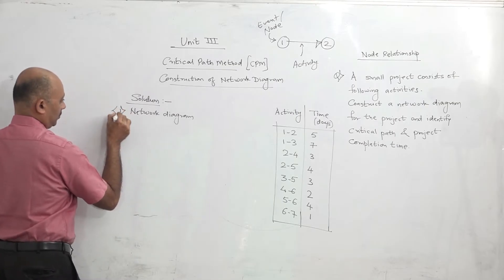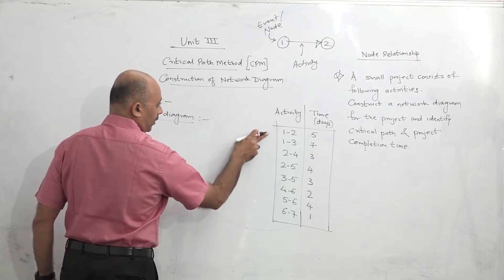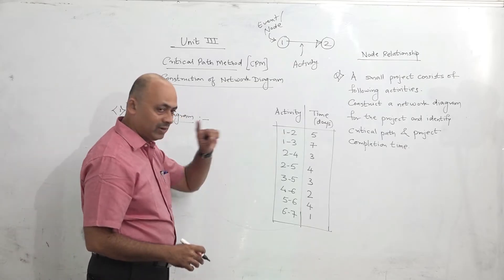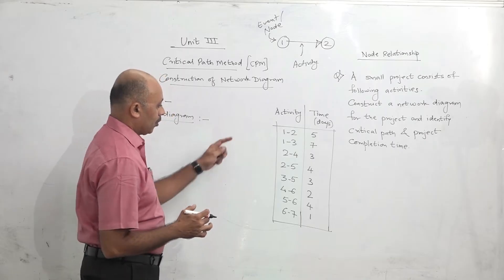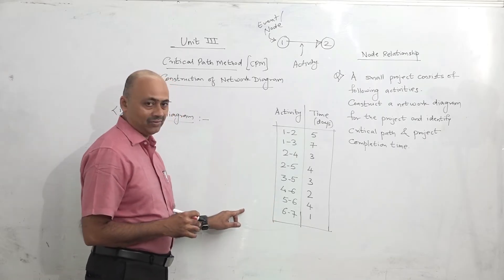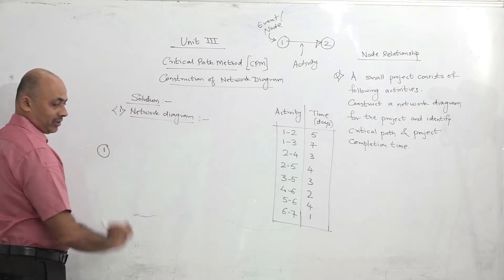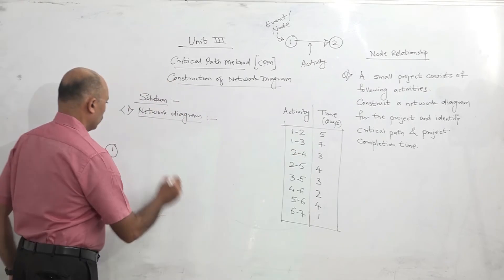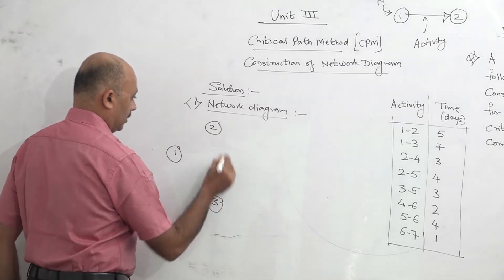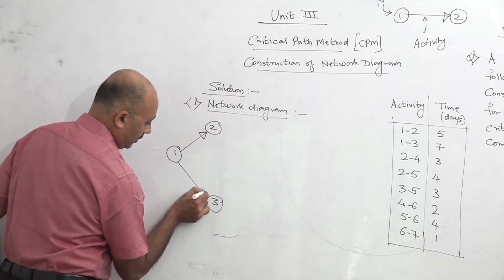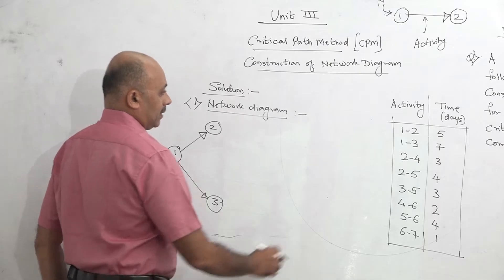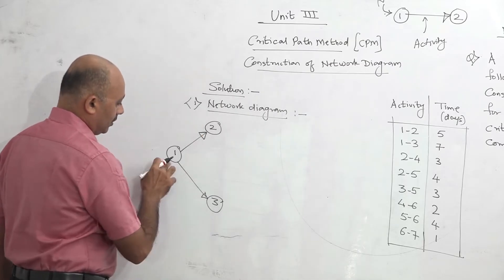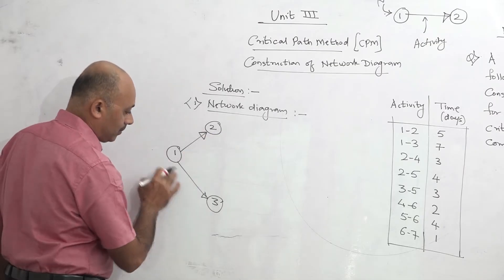The first step is construction of the network diagram. The first activity is 1-2, and the second is 1-3. It means from event number 1 — event number 1 represents the start of the project. The project consists of 8 activities. From event number 1, there are 2 activities starting: 1-2 and 1-3. So this is event number 2 and this is event number 3. This is activity 1-2 and this is activity 1-3. These 2 activities are starting simultaneously.